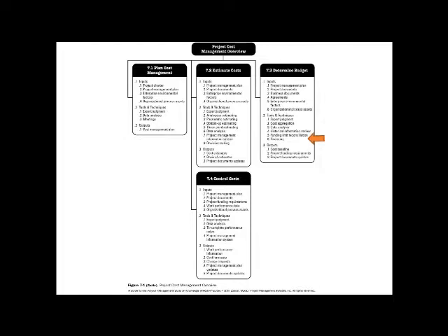Particularly for really big projects, a project manager should be aware of where the financing is coming from and how to manage that throughout the process. And cash flow in particular for construction project managers especially, we are responsible for managing the cash flow in a project, and that is part of the financing. Multi-year projects particularly, this reflects the increasing complexity and the increasing size of some of our projects and the global impact of some of our projects.